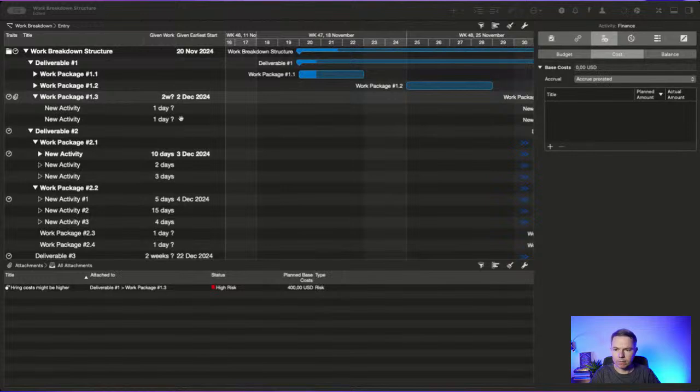And I might repeat myself, but again, rolling wave planning is not that different from doing it the Scrum way. You just do high-level planning on things that you don't know yet, and you plan out the work packages and tasks for the next 2 weeks, 4 weeks, if you can, and you continuously put planning effort into your project. That's the right way to describe it, because you do the same thing in Scrum.